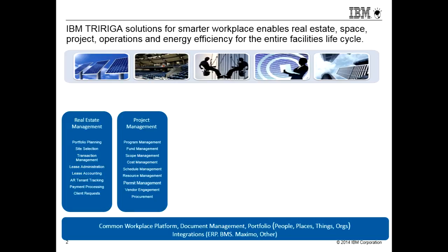Maybe if you look at, say, a university, where a university might want to build a new building, and the university has part of the funds itself. Maybe the government provides funds. Perhaps they have a bond referendum to provide funding, and the Alumni Association provides funds. So you can track all these different funding mechanisms against your projects and programs. And of course, we have to manage our scope and our cost. We have to manage schedule and resources.